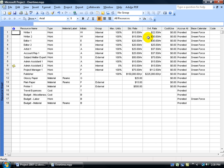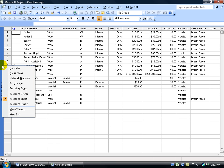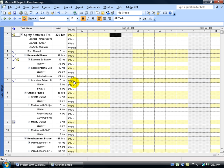Now that we know that anything over 8 hours within my project here is going to be overtime, and we know that we have the overtime rate set up, let's go ahead and start entering in some overtime hours. There are three places you can enter overtime in and they are your task usage view, your resource usage view, and your split window. Let's do the task usage view first. Come over here, right click on the collapse view bar and select task usage.